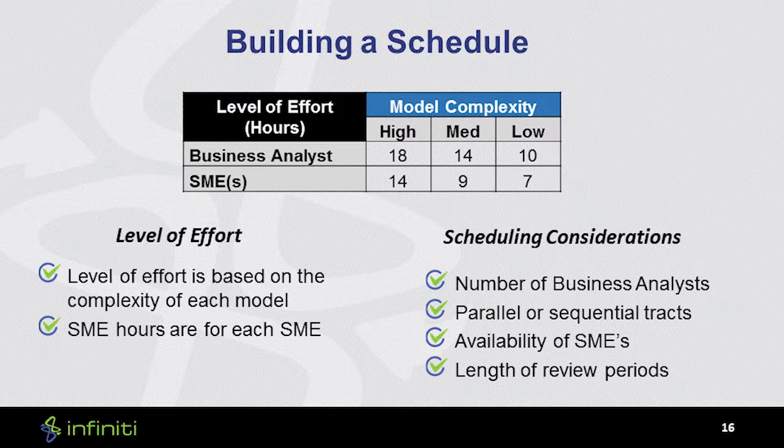Just through experience and by doing these models, we've been able to come up with some estimates about how long it takes to do a model. After you've figured out whether you have models of high, medium, or low complexity, you can use these ballpark estimates to determine how long it's going to take to do a single model. And then on top of that, you do the math.